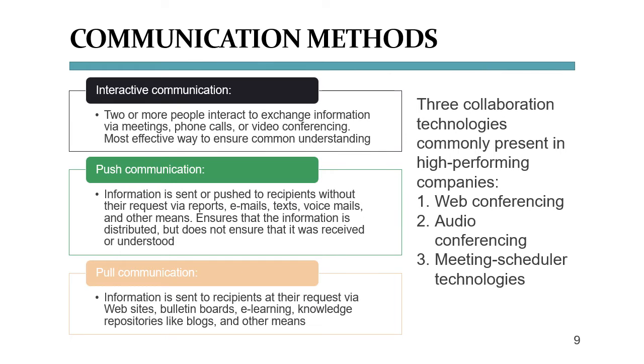To be sure, PMI lists 3 different communication types. The first one is interactive or two-way communication, in which you are having a direct dialogue with your stakeholders. The goal of interactive communication is to come to a common understanding of important product features and project parameters, like scope or requirements clarifications, schedule clarifications, and so on. You will also use interactive communication to announce bad news to the stakeholders, because this will help resolve questions and comments immediately and prevent rumors from forming.